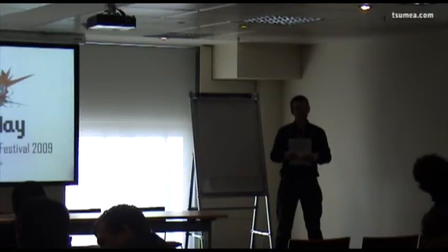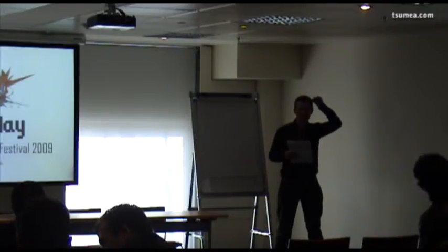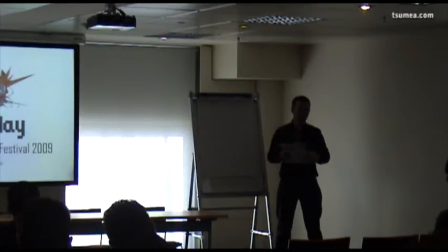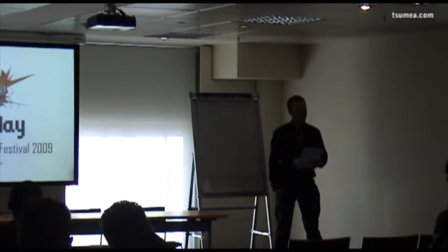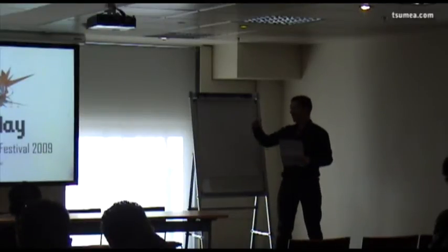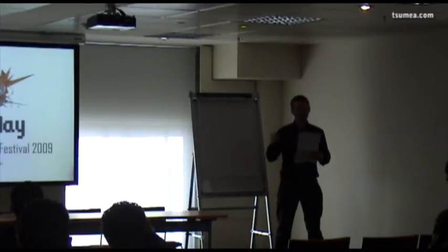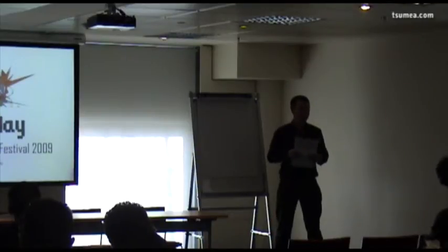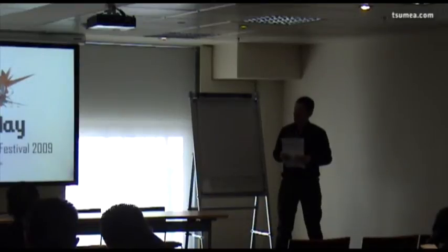But basically, when you've had your sprint planning meeting, when you decide what you're going to work on during the month, after that someone just sits down and punches everything into your tool or your spreadsheet, and then day after day, at least once a day, you tick off the amount of hours that you've done, and it shows this chart. And you can tell pretty quickly if there's a big hold up, and if someone needs help with a problem, or if you missed an assessment or something.